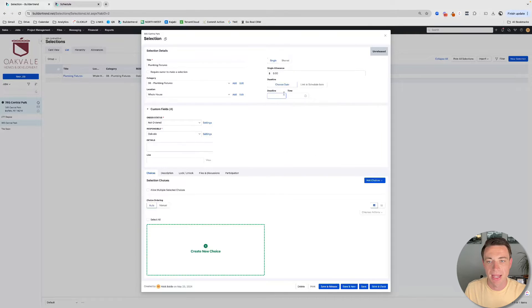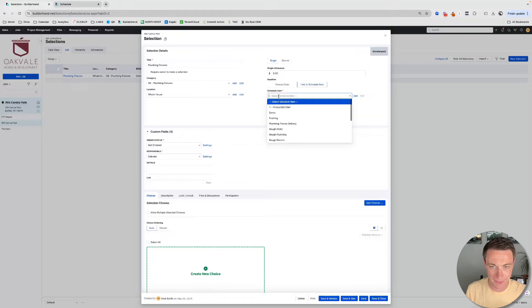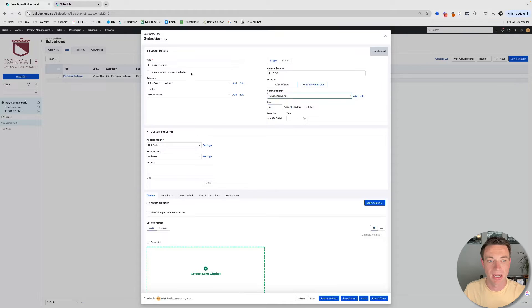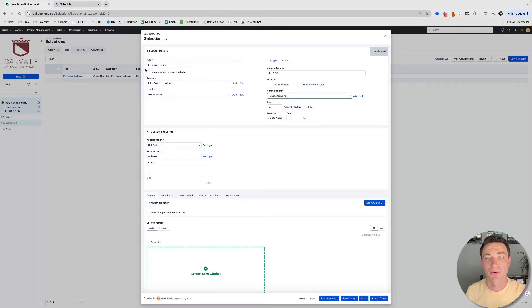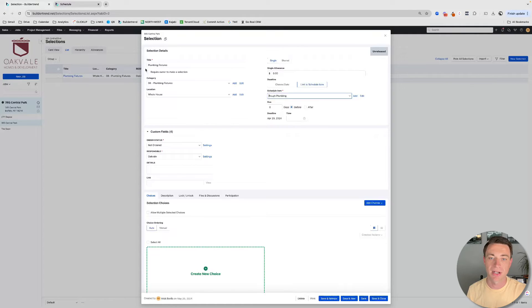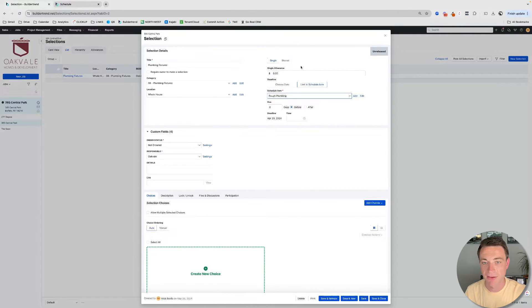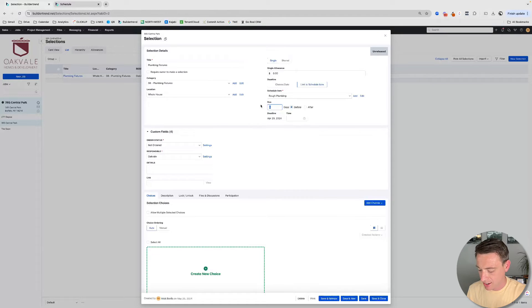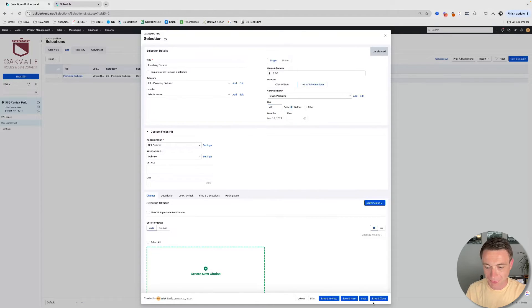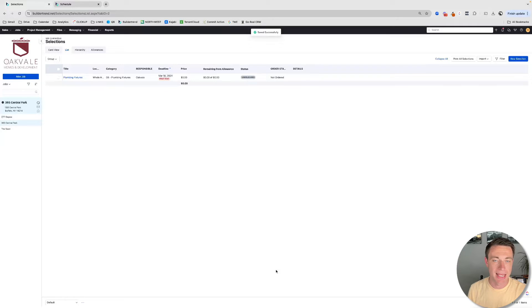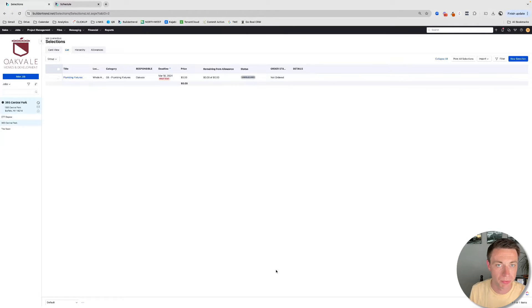Or better yet, I can tie it to that schedule item. So, how about rough plumbing? Before we start rough plumbing, I'm going to need those plumbing fixtures picked out. And this is usually picked out, right? And so if we're picking them out, we probably need to pick them out by a certain date and then build in some kind of buffer for deliveries and getting them on site, making sure we don't have issues. So I'm generally going to say, if rough plumbing starts on April 29th, I better have my plumbing fixtures selected, let's say, six weeks in advance. That's 42 days. Calendar days is what's happening here. And I'll save and close that. And now, as my rough plumbing moves in or out, that date, that deadline for this selection will move as well. Really, really powerful.